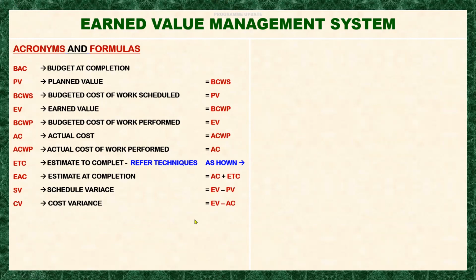always remember that earned value is the same thing as performance. This is the one that you earned on your effort, on what you have done for the project or for the activity. And then the actual cost, of course, that is your expenditures. So that means here you have to compare your performance against your spending.